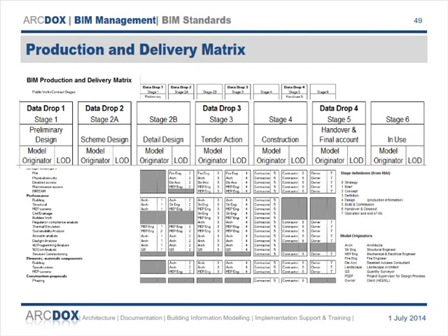5D cost analysis, who is doing that and at what stage in the project are they doing that? That's likely to be a role that the QS will do to begin with, and the contractor will probably do later on. Some things will pass from one person to the next. I mean, the architect will probably do everything at the first stage, and then some of it will pass over to the MEP. Who's responsible for the sanitary ware? It'd be the architect at the beginning, maybe the MEP consultant at some point, and then that'll pass over to the contractor or the MEP contractor at some point, or whoever's putting them in as you work through the project.